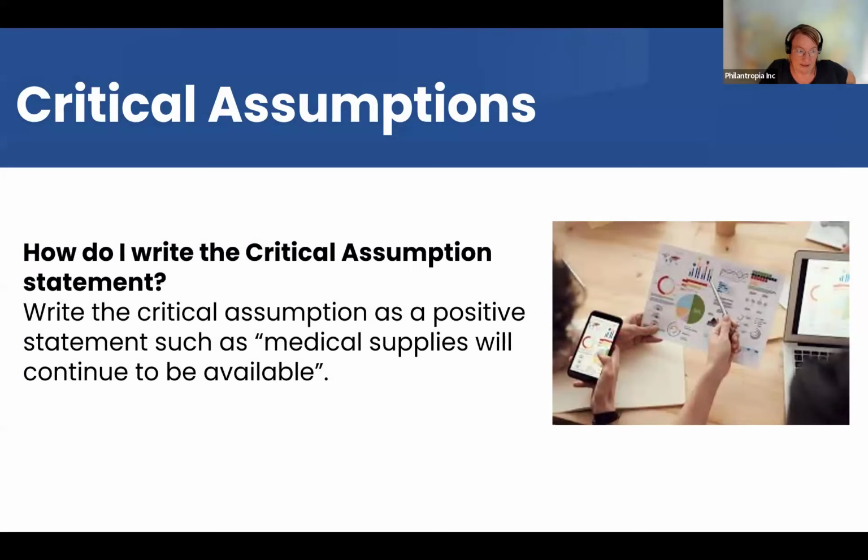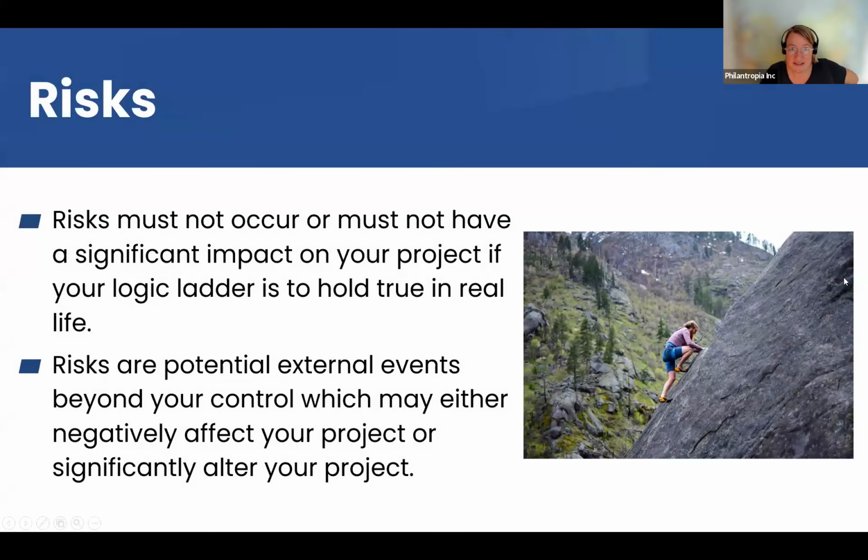How to write the statement? It's a positive statement such as medical supplies will continue to be available. Teachers will continue to work for this school. The climate will stay the same, like a positive statement. Risks are things that must not occur or must not have a significant impact on your project if your logic ladder is to hold true in real life.